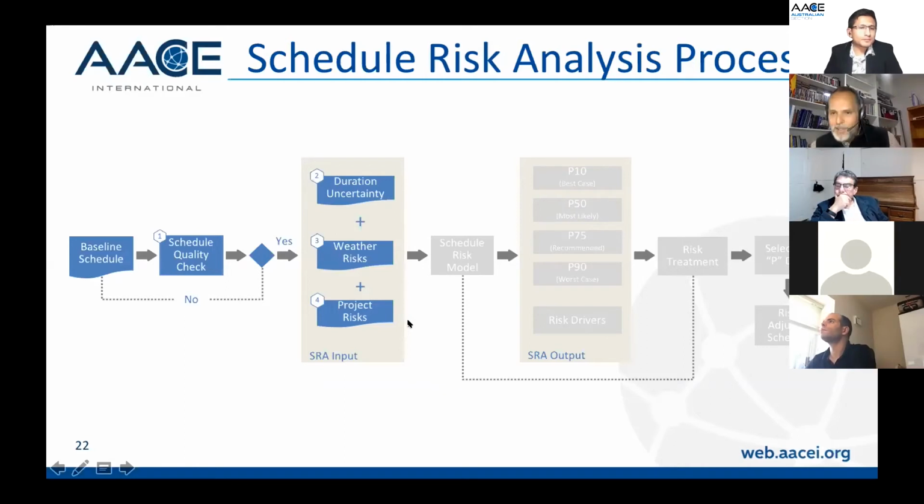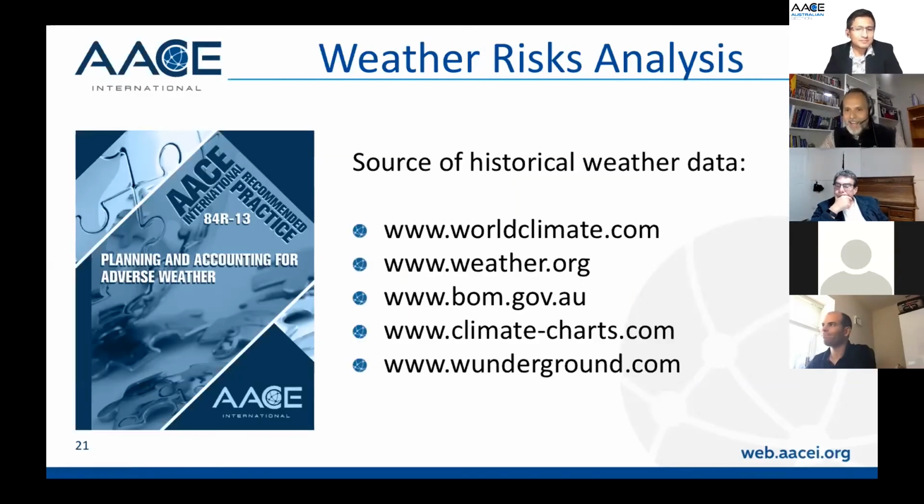Let me answer the last question about weather, and then we move on. If we need to submit a weather included schedule, how do we prepare the program for the baseline schedule when we're doing weather analysis in the SRA? Again, as I mentioned before, Rajesh, you have two options. You can include your weather in your baseline calendar. I know some people prefer to block working days in the calendar, and say, I know that I'm going to lose 1 or 2 days in a specific month because of rain. And then you use a specific calendar for these activities in your schedule.